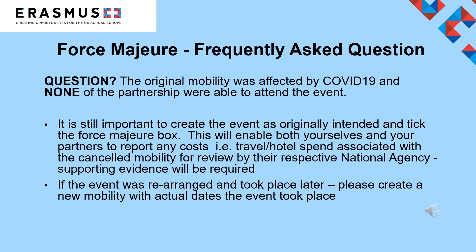Here's a frequently asked question about force majeure. If the original mobility was affected by COVID-19 and none of the partners were able to attend, the event as originally intended should still be created to allow any unrecoverable costs to be reported. If the event was rearranged and took place later, please create a new mobility with the actual dates. For other force majeure events, please refer to your contract under the General Conditions Annex 1 — the mono-beneficiary version is available on the website.